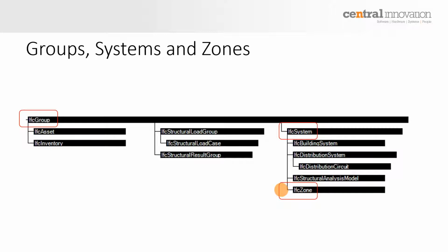And then you do the same for exterior areas, and then you do the same for circulation, and you can group them and make a breakdown structure of the spatial division of the project. You can do so by using IFC zones and dropping in there all the spaces that you have used in the particular file. So let's go and take a look at that and how you create that and how you probably use that in a practical way.